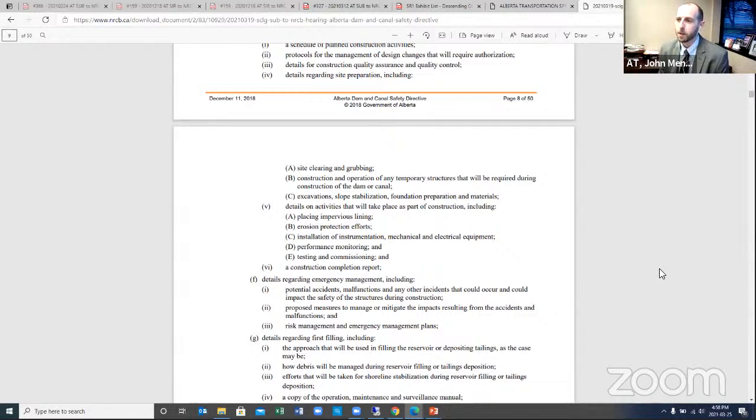As part of the design, we're developing requirements for the performance of a number of mechanical, electrical, and other instrumentation and structural components that will have to be proved out prior to acceptance by the government and handover.